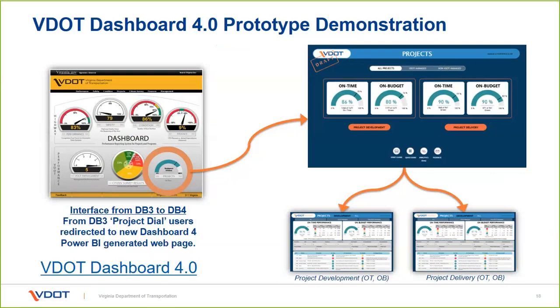Occasionally things come up, and our targets are set in such a way to allow that flexibility. We're looking at our targets for delivery at 77% for projects on time. That's a C. We're not asking for an A+ here. So while things happen, hopefully they don't happen that often, the original date in the contract is what we would hold to.